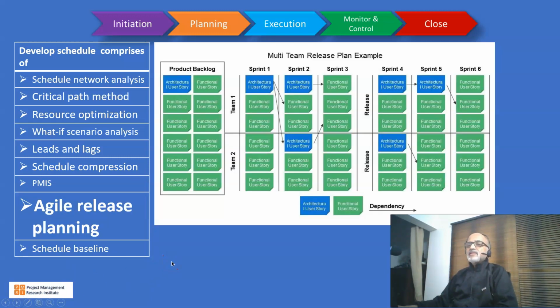And the next is agile release planning. Now our program itself goes like iteration 1, iteration 2, iteration 3 to iteration 10. So initially when I plan, I need to decide on the total number of iterations, how many topics each iteration will comprise, and which topics should be first and which should be later. This process we call release planning.